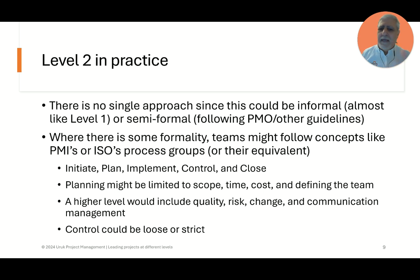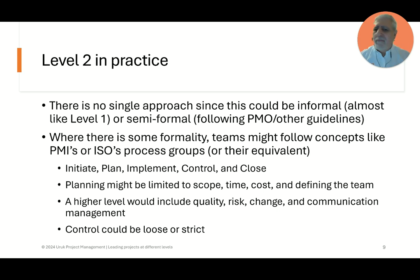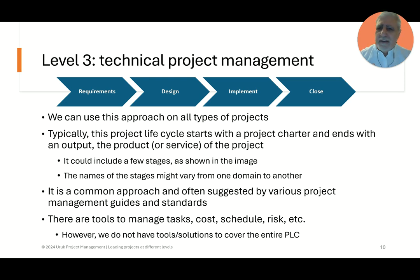We follow processes like PMI — initiate, plan, implement, control, and close. Planning in this case might be limited to scope, time, and cost, and defining the team — a little bit more than level one. At a higher formality level, if the organization has a PMO or guidelines available, they might have some processes to include quality, risk, change, and communication. Control could be loose or strict depending on the organizational level of maturity. Note that this has nothing to do with the maturity level of the organization — these levels describe the type of project management applied in different contexts.